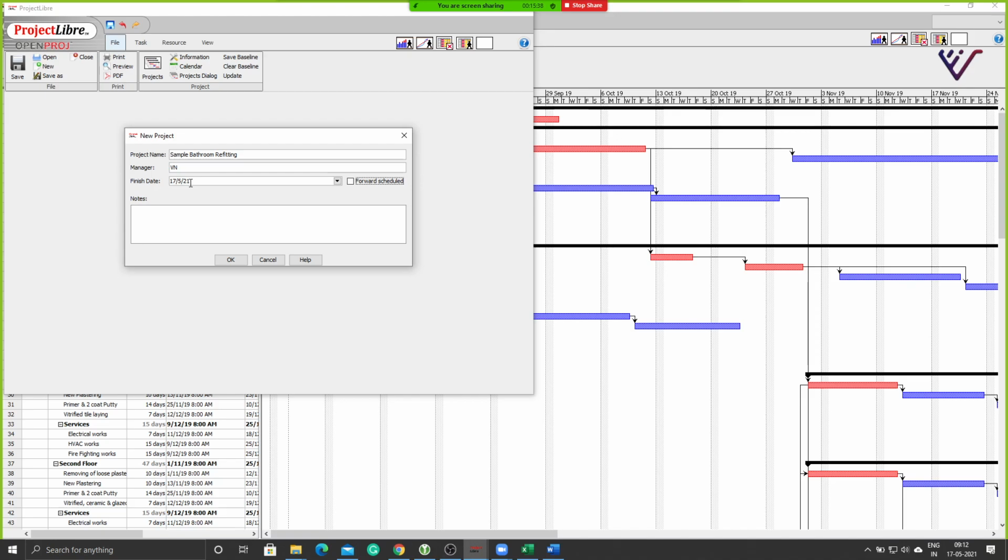For instance, if it's a client driven project where the client already has set a deadline, the last date or the handover date for the project, then you would want to work in reverse, backwards, to ensure that you are hitting that milestone correctly. But if you are the one proposing a timeline and the schedule to the client, you would always do a forward schedule so that you have more leeway and time to work with. You get more lag to work with. We will look at that when we are creating our schedule.